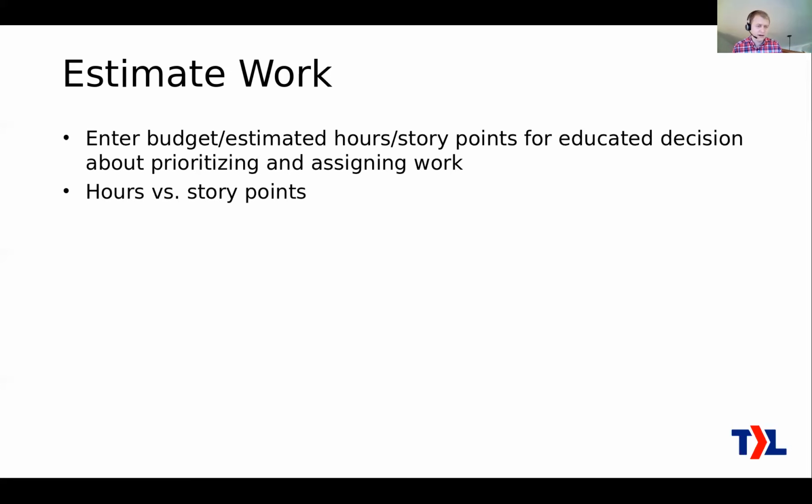The advantage is that usually the whole team can agree on a measure of complexity, whereas the number of hours really depends on who's doing the work. A junior engineer is going to take way longer to do certain work than a senior engineer. So who does the work is going to have an effect on the estimate. Story points avoid that problem.